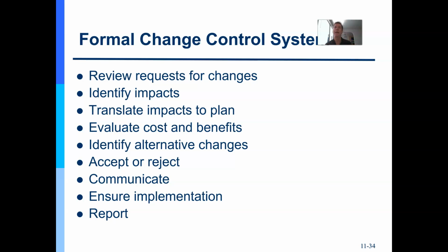Here's an example. If I'm building the Freedom Tower complex in New York City, right, I might get my sponsor to agree that any change up to $10,000 I can approve. And every month I'll summarize them and give you, sponsor, a report. Any change between $10,000 and $100,000 would come to you for approval, and any change over $100,000 in this 9-building complex would go to the change control board. See, there's a change control system now that doesn't overburden people and yet allows authority, accountability, and responsibility at the right levels.